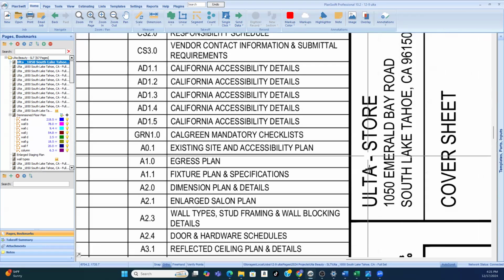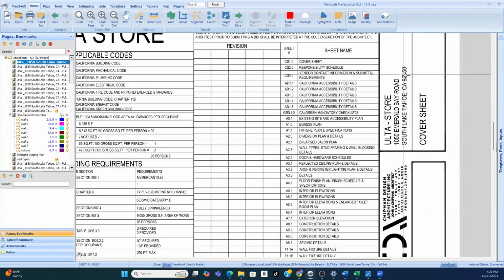It'll give you the project name, and you've got to have the physical address, because yes, all of our pricing, all of our labor, all of our everything is based on the physical location of the project. And so you always want to make sure that you are pricing it based on the physical location of where it's at. And some GCs will say, oh, price it for 60 days out. Well, how are you supposed to know what drywall mud is going to be 60 days out? Your supplier's not going to tell you that. That's not part of the game, even though they want you to do that.